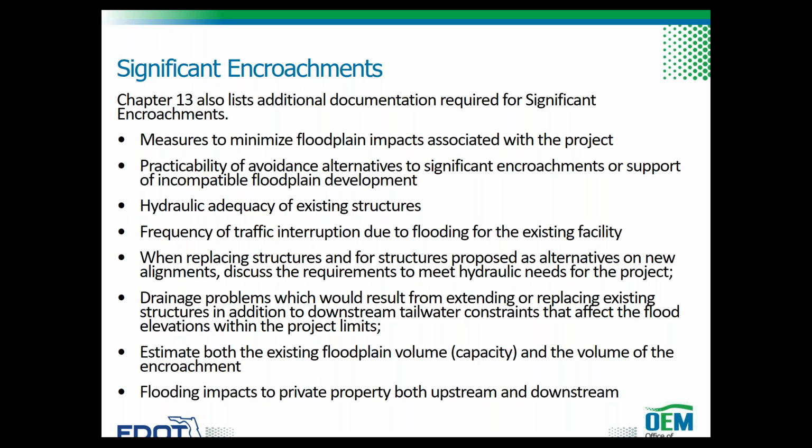When replacing structures and for structures proposed as alternatives on new alignments, discuss the requirements to meet hydraulic needs for the project. Drainage problems which would result from extending or replacing existing structures, in addition to downstream tailwater constraints that affect the flood elevations within the project limits. Estimate both the existing floodplain values or the capacity and the volume of the encroachment, and flooding impacts to private property both upstream and downstream.